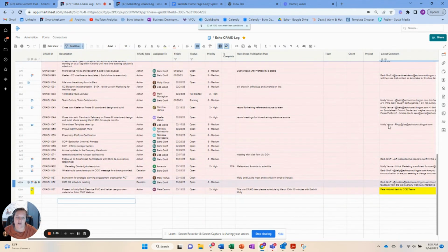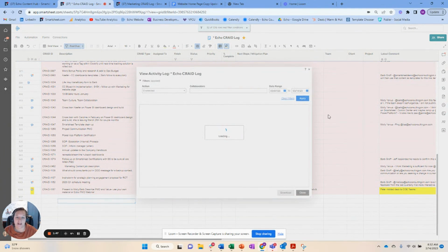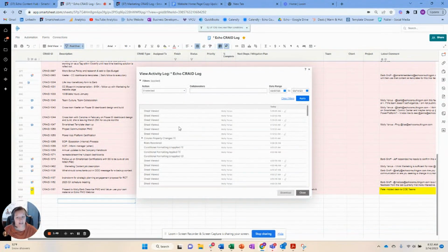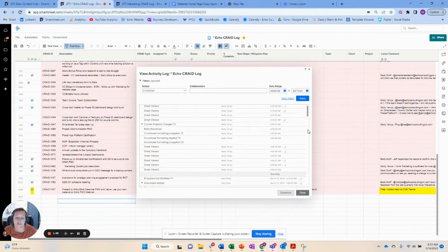So I can see, okay, P added here. This is something that was highlighted changes. Okay, so this is highlight changes. The other piece I can do is go over here and click on activity log. And activity log gives me more of an export view of all the different changes that were made by who. So I can just see this running log down here.